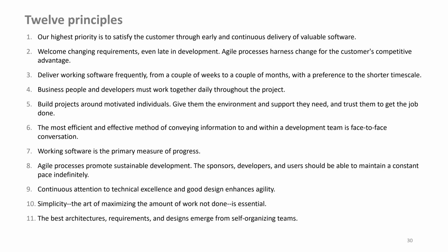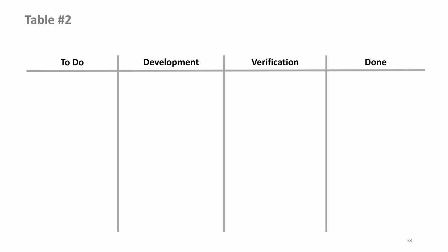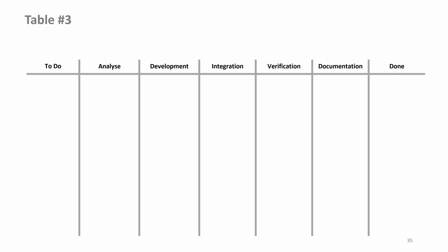To speak of Kanban, we need to visualize the flow of work here. We can visualize the workflow by looking at it in more detail. The step In Progress could now be divided into development and verification. That would make it a bit more precise. We can refine the whole thing even further. Our workflow usually looks like this.